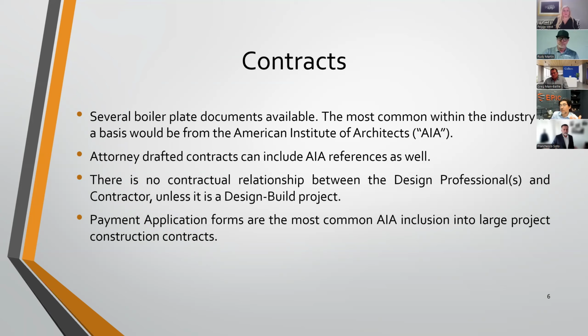So if any sort of issue arises, big or small, or a question initially arises, from an engineering standpoint, I'm going to two spots. I'm going to my plans, and then I'm going to the contract, all the contracts that exist. And if those answers aren't in there, then it's time to go ahead and think, right? So the hope is that you can capture as much as you reasonably can within these planning phases, so that it is, okay, well, if this scenario comes up, then the contract or the plans say to do that. Good to go. Easy RFIs, easy communication. We can blow and go still. We're okay. That's the intent.